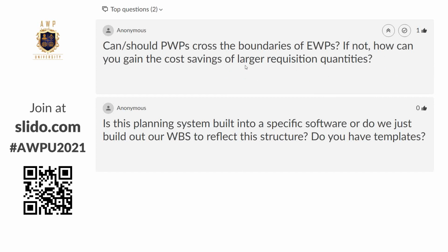Obviously with larger cost savings in requisitions and bulk buys, we're going to have that effect. And then that schedule activity for those bulks will tie to it. Where it gets more complicated is where we've got bulk buys with multiple delivery times. For instance, if we've got a PO that's saying that there's going to be 3 different deliveries, sometimes the allotment of bulks, just like anything else in material management, can be difficult.